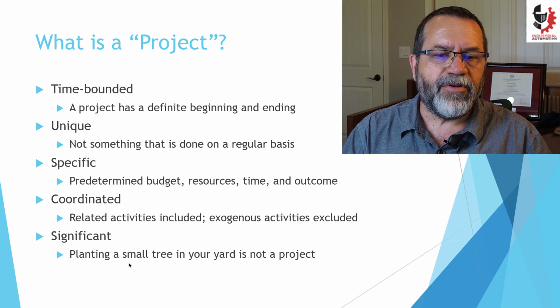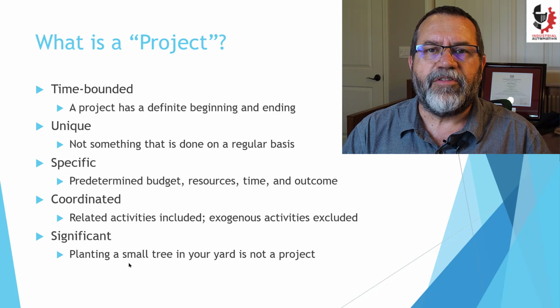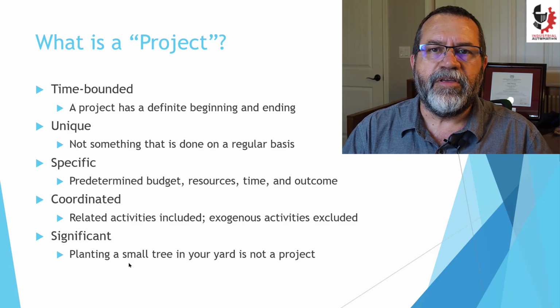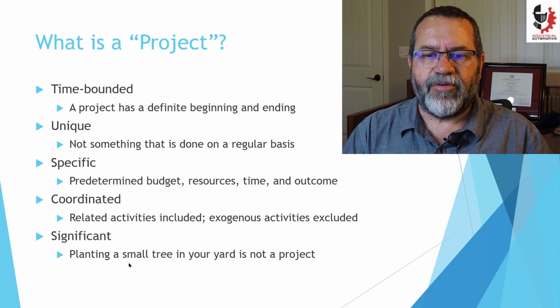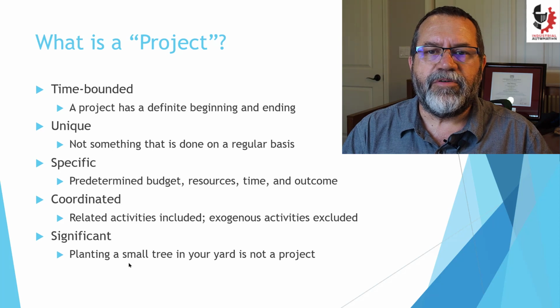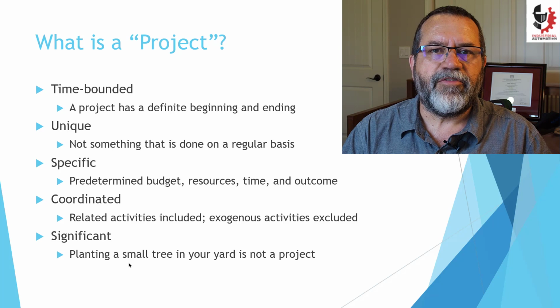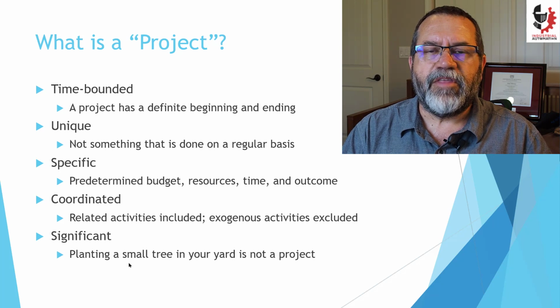It has to be coordinated. The project includes all the activities required to do that specific project, and it does not include external or exogenous activities. If you were building a new building on the campus, a new student resource building, then that would be a project. Doing a parking lot repaving next to the building would not really be part of that project. Project itself would be to construct that building.